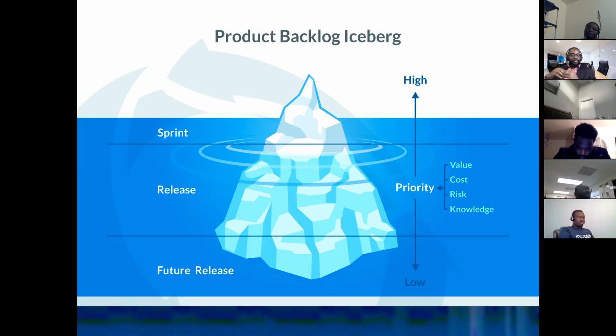Because it's not waterfall. We don't refine and prioritize every single thing at the same time. We try to prioritize the whole backlog, and we focus on what is priority. Okay? So that means that you're always going to have at the end like a pyramid shape or an iceberg. And the tip of the iceberg that you see is the set of product backlog items that are the highest priorities and defined correctly and refined as well. And you're gonna have few of them, just what you need to be working on the next sprint. Okay, so that's for the sprint.